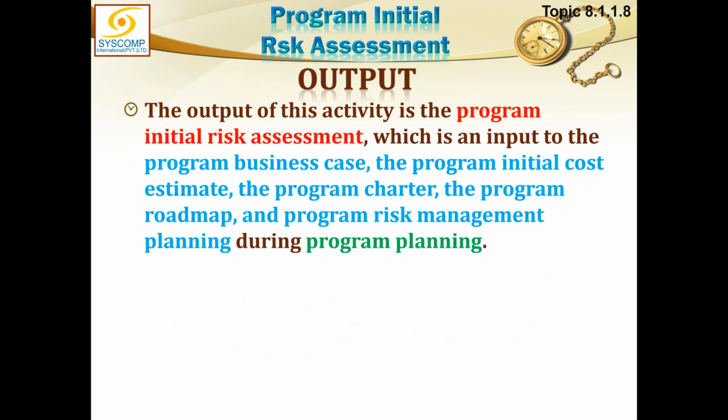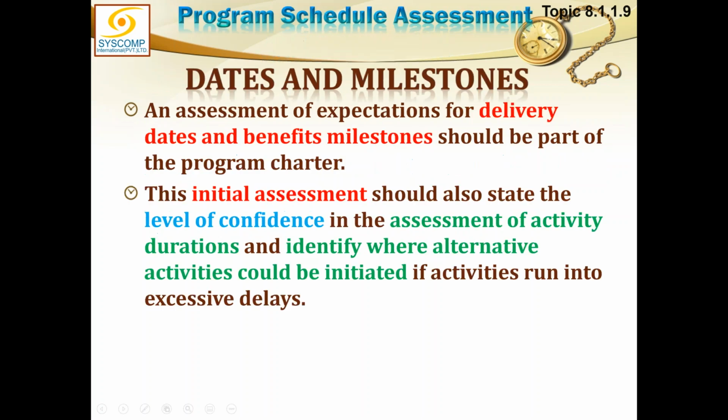The output of this activity is the program initial risk assessment, which is an input to the program business case, initial cost estimate, program charter, program roadmap, and program risk management plan. So this initial risk assessment is going to be affecting many documents which are being created.